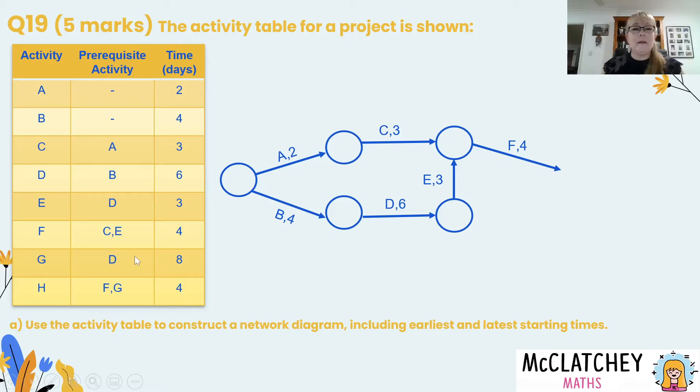Now if I look further down in my table I can see that activity G needs to come out of activity D. Here's activity D. So it's going to branch out from here and then both of those activities are going to join together here with a final vertex where activity H has F and G as its prerequisite and then we finish our diagram entirely with another vertex at the end to indicate that the project is complete.